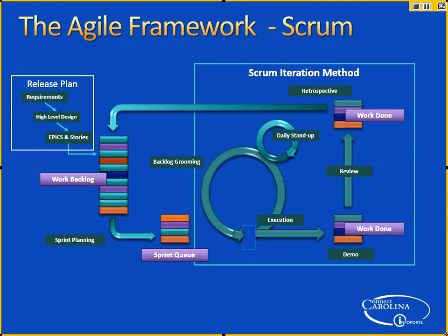When the work is all done, you've got all of these stories through the implementation, through the change management work, you're done, right? That's when we talked about this. There's a demo to the product owner and perhaps other executives. We're showing you what we completed in this sprint. It has to be executable, it has to show value.